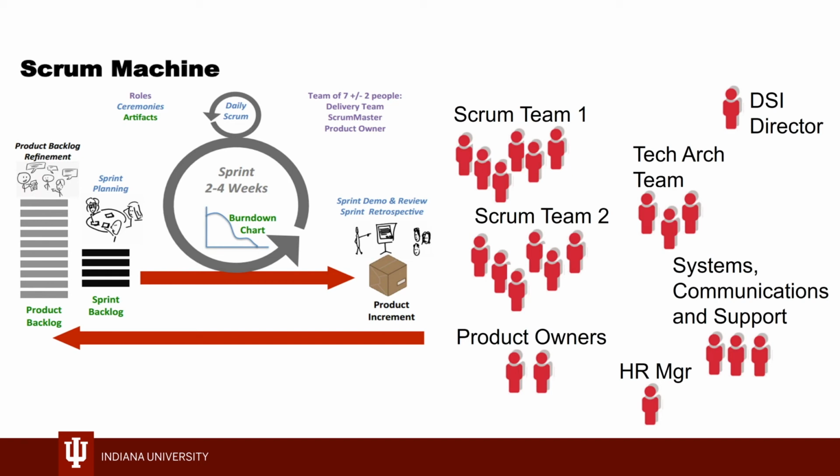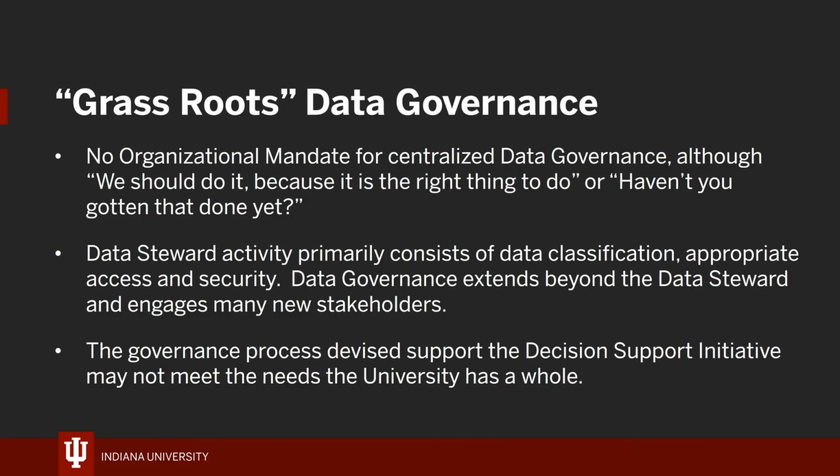But perhaps a 2-week development sprint, which is sort of typical, is too short for BI. Currently, we're in about a 4-week development sprint where we try to standardize, set our goals, and accomplish those in that sort of cycle. So Agile BI, in terms of learning how to do it, has been just as agile amongst the management of the team as it has been the actual development execution. So Agile BI was a challenge.